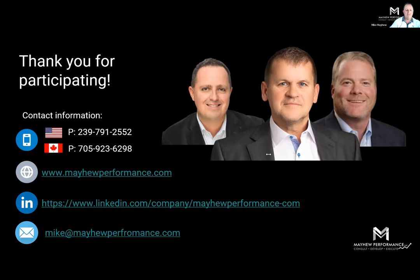Okay, so there's two questions. I'll answer the one on ventilation, Gabby. Yes, there are mining companies where we did some peer review and selected different sizes of equipment, same OEM, different size, because we went from diesel to battery electric. We reduced the drift size. For those that want numbers, on average it's $3,500 Canadian, not US, plus or minus, and you can check the local contract, or $4,000 or $5,000 depending on who you use, per meter cut in development.